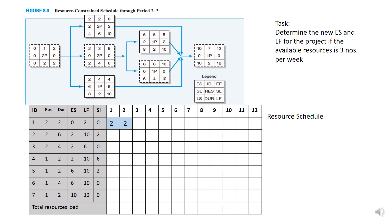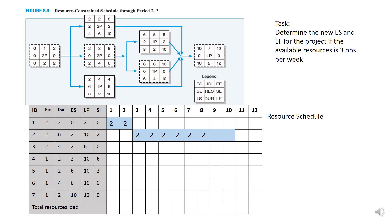So for activity 2, it starts on week 2. But logically, you cannot start at week 2 because activity 1 has not completed yet. That means you need to wait for activity 1 to complete then activity 2 can start. It completes on week 10. If you notice, although the duration of activity 2 is 6 weeks, it can finish at week 10. The difference here is what we call as slack or float.